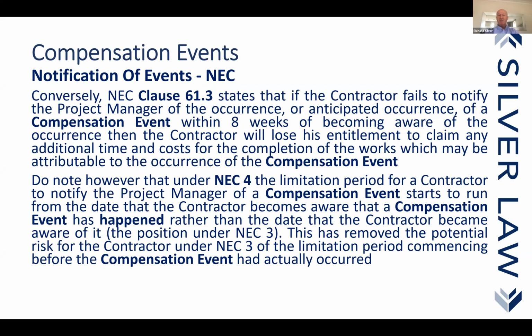Now, as far as those notices are concerned, there is a possibility that if the contractor fails to issue either an early warning notice or a compensation event notice, their entitlement may be reduced or indeed lost. I'm going to say that again. If you do not issue certain notices under the NEC, you could totally lose your entitlement. Now, let's deal first of all with an early warning notice.